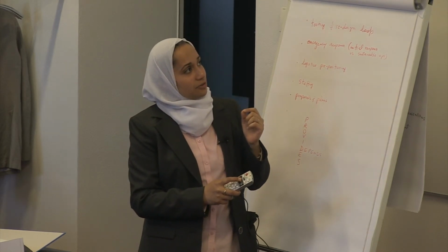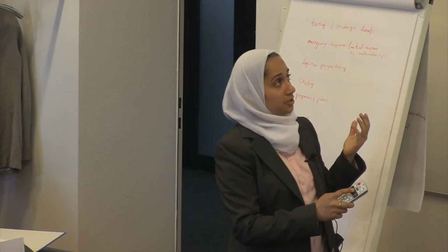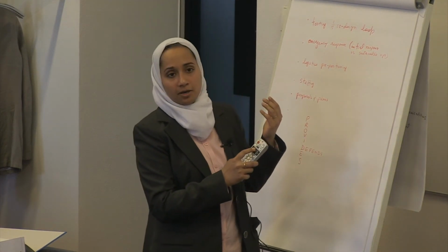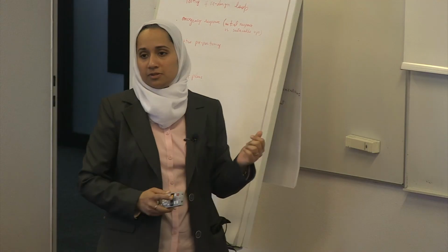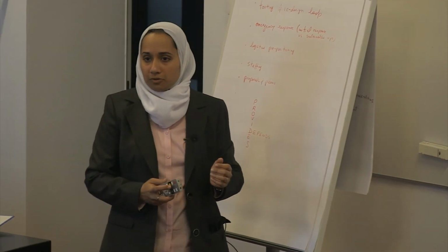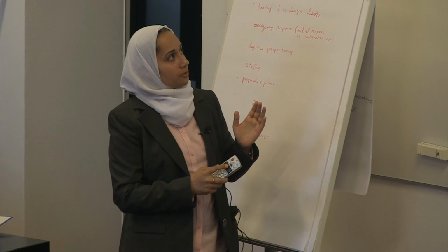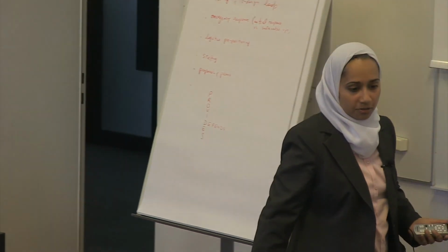But if you have X's on the right side of the diagonal, that means you have cycles, you have iterations. And it's a very quick way of spotting right away whether you have cycles, iterations, or whether everything is just proceeding in a feed-forward manner. This is essentially a feedback arrow. So the elements on the right side of the diagonal give you an indication of feedback in the system, and elements on the left side of the diagonal, often called the lower part of the diagonal, are an indication of feed-forward connections. So this is the lower part of the diagonal, and this is the upper part of the diagonal. Those are terms that are also often used.